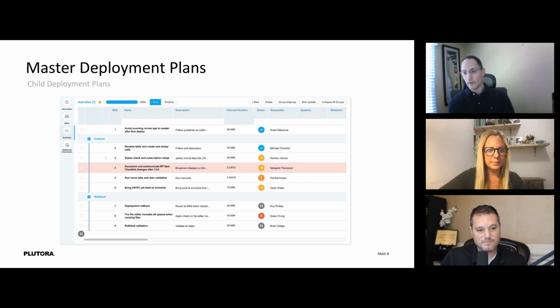So we don't allow somebody to have both roles. So it's usually the technical leads that are the approvers, and the development folks that are the people creating the plans. They're the authors. So there's a check right there where somebody at a little bit more of a lead level is reviewing the plan for accuracy. That's the first thing.